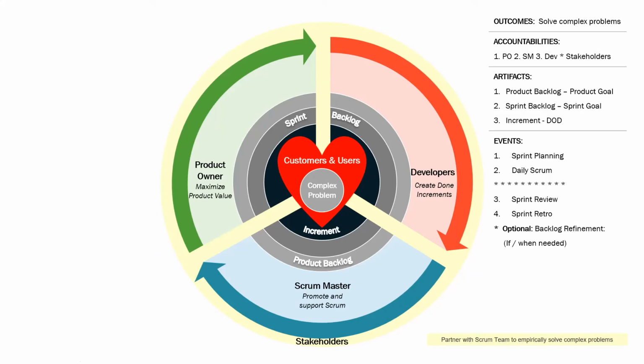Sprint review is followed by a retrospective where the Scrum team gathers in a safe space to reflect upon what happened in the recent sprint, what worked well, what could have gone better, and what adjustments they might consider in the next sprint. These events are encapsulated in a container event called the sprint. And after the sprint retrospective, we move to the next sprint, rinse and repeat.